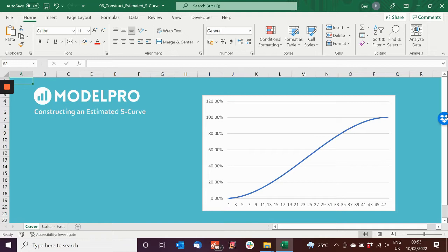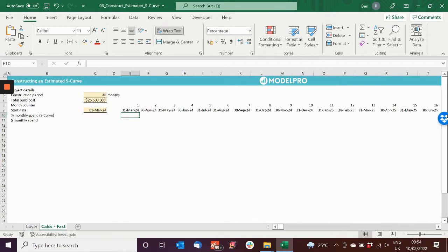That's because, take for instance a construction project, the bulk of your costs will be incurred in the middle of that project. At the beginning, you have things like investigative analysis, engineering reports, etc. And then at the end, you have some kind of quality assurance, commissioning, etc. But the real spade in the sand and physical construction and steep costs are incurred in the middle periods of the project. So how do we do it?